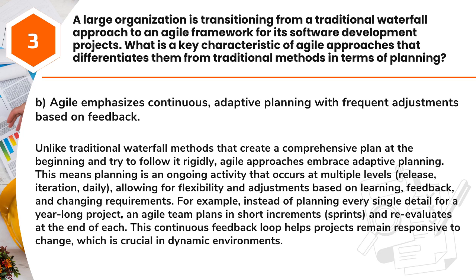For example, instead of planning every single detail for a year-long project, an Agile team plans in short increments, sprints, and re-evaluates at the end of each. This continuous feedback loop helps projects remain responsive to change, which is crucial in dynamic environments.